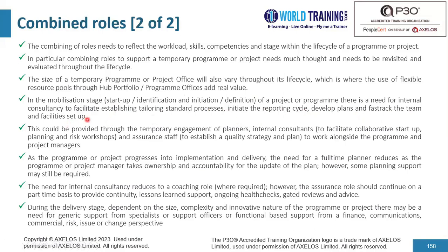So it's good to make sure that we have roles who could help in the mobilization of projects and programs. This could be provided through the temporary engagement of planners, internal consultants to facilitate collaborative startup, planning and risk workshops, and assurance staff to establish a quality strategy and plan to work alongside the program and project managers.